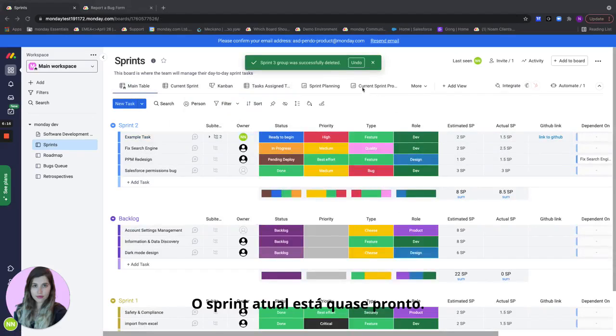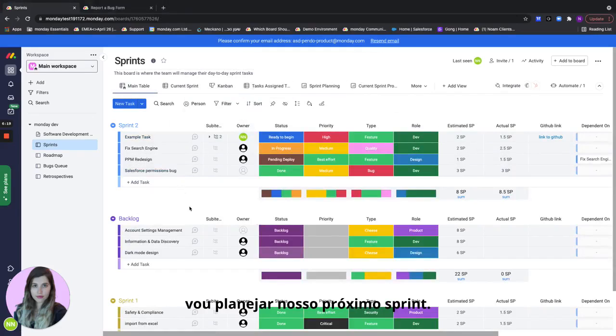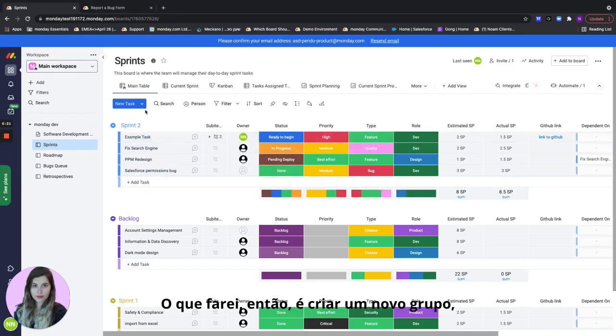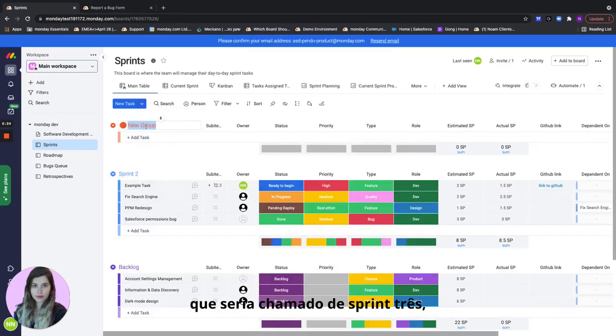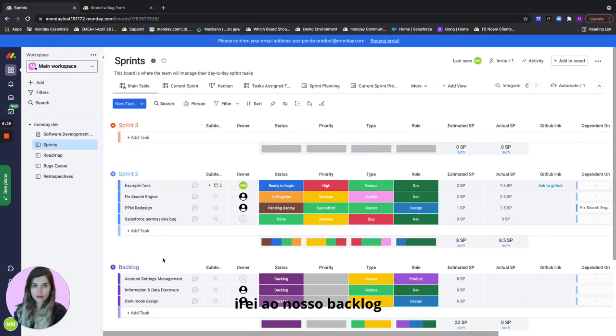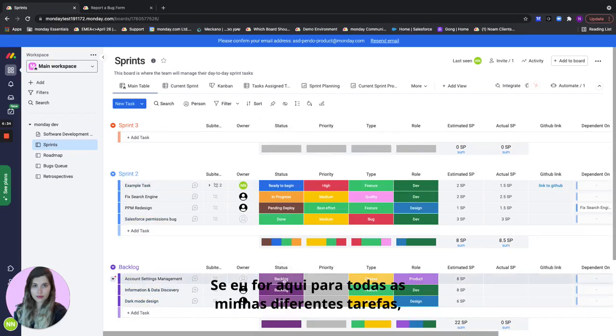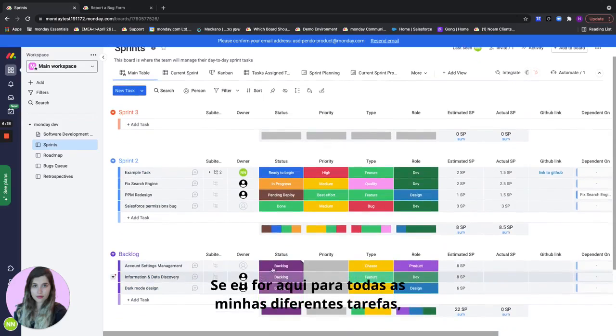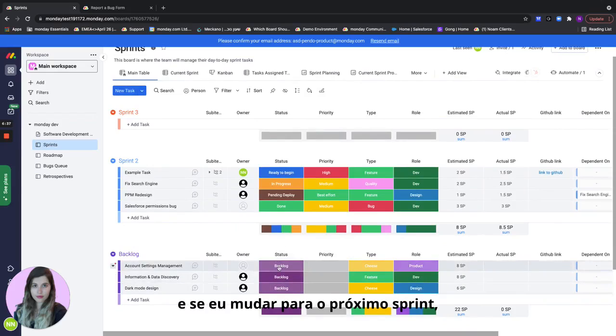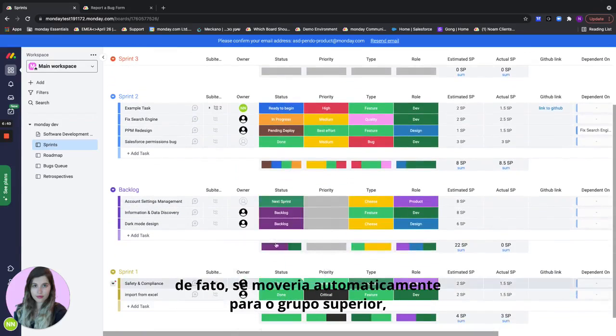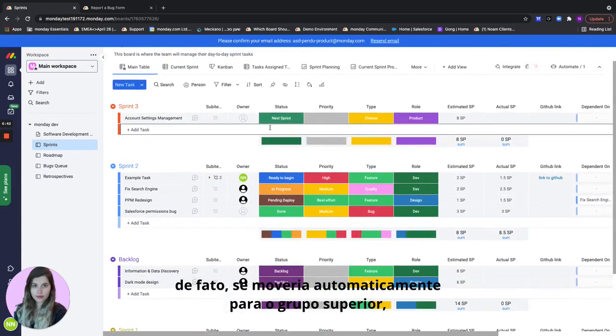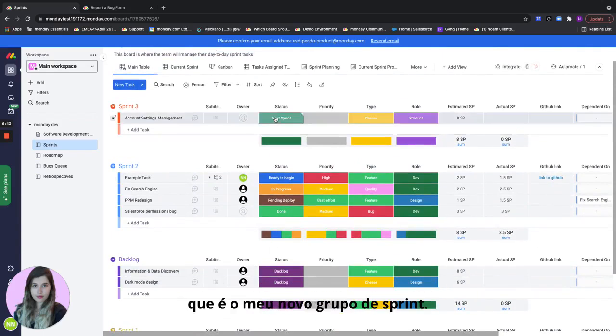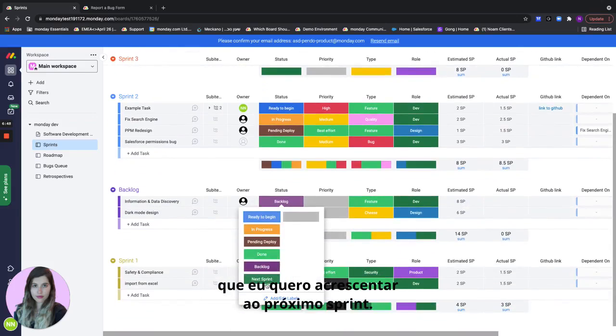So the current sprint is actually almost done and now I'm starting and I'm going to plan our next upcoming sprint. What I'll do is I'll create a new group which would be called sprint three and I will go to our backlog and start designing what's going to be in our next current sprint. If I go here to all of my different tasks and if I change it to next sprint it would actually automatically move to the top group which is my new sprint group. So let me add all of the items from my backlog that I want to add to the next sprint.